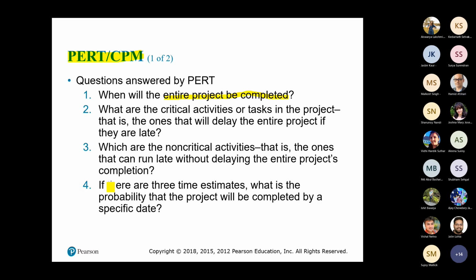For example, if you don't have enough people today, you may move the person who is working on a non-critical activity to critical activities. Then you will save the critical activities, yeah? Because you are playing with your resources, any types of resources.